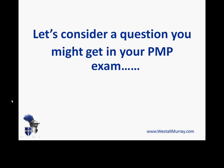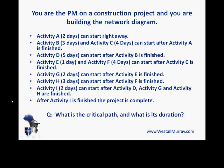We talked about questions that might come up. Here's an example of one — please don't panic, it looks more complicated than it really is. Typically, you'll be asked to construct a network diagram. It'll give an intro to say that you're a PM on some type of project. Then it will list all the activities. For example, Activity A, a two-day activity that can start right away. Then Activity B, three days; Activity C, four days. It will also tell you where those activities fit in the network by telling you when they can start. In both of those cases, they can start after Activity A is finished, and so on with the other activities.